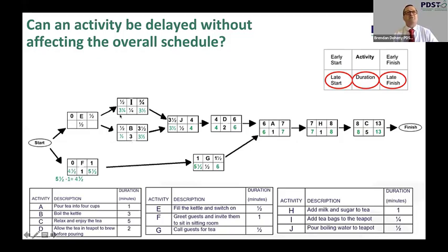And now we're back up to probably the biggest decision of this graph. What will be the latest finish for E? Will it be 3.25? Will it be a half? We could seek verbal solutions from our students, and in that response, students may determine that this process is actually the reverse of the earlier forward pass method, and for that reason, they're going to select the smaller of these two values. And that would be a sensible approach.